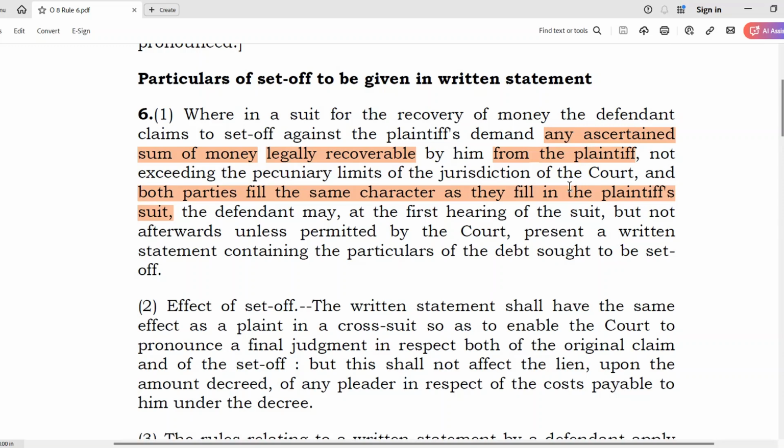Though it says the defaulting party will be liable to pay damages, there is no quantification, no formula, no parameters given. Therefore, there are no liquidated damages provided in the contract. Since there are no liquidated damages, the damages need to be ascertained, as there is no certain amount of damages.